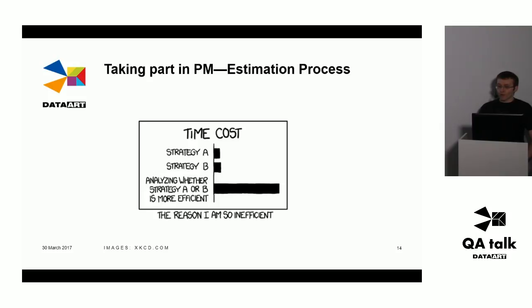Finally, provide quality assurance information early in the life cycle. Manage people's expectations. The worst thing you can do is come to the very last day of the release and say that there are 20 blockers. If at an early stage you don't have precise information, but you give some information, it may still be available for your project manager, it may be available for the client, and it may allow them to make some decisions that improve project health.